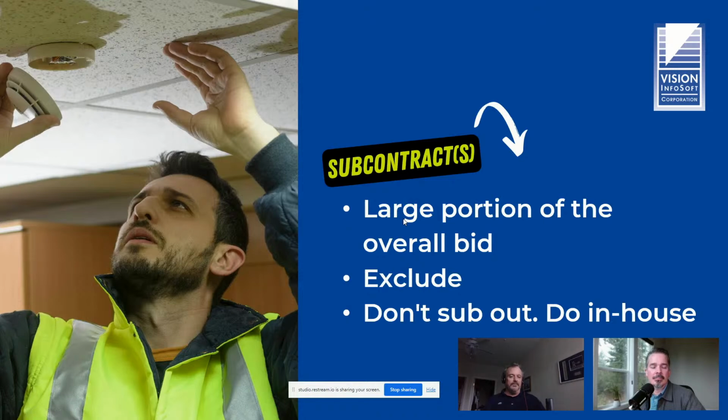Another red flag for me when doing a competitive bid is the subcontracts on the job, especially if it's a large portion of the overall bid. If you're doing a $500,000 electrical bid and 250,000 of it is fire alarm, then a large portion of the job obviously is not your area. So you're really subject to the subcontractors' competitiveness. Again, you're vulnerable if they give other electrical contractors better pricing. So you just got to be watching out for all these things, and you're not always going to know.